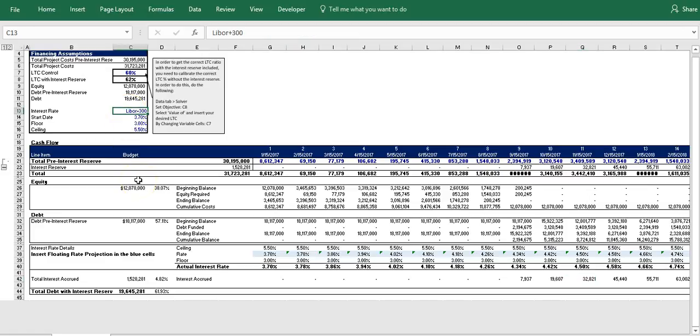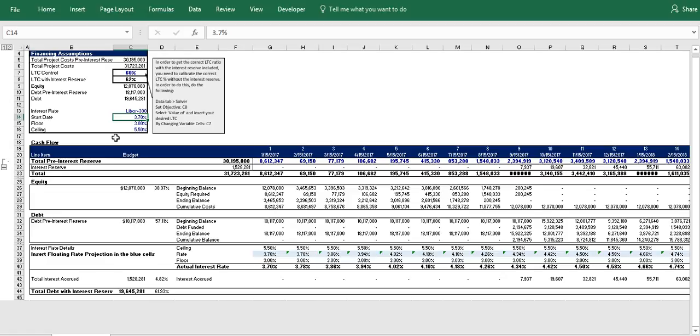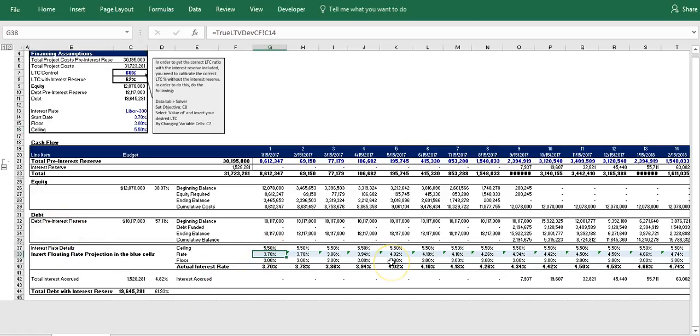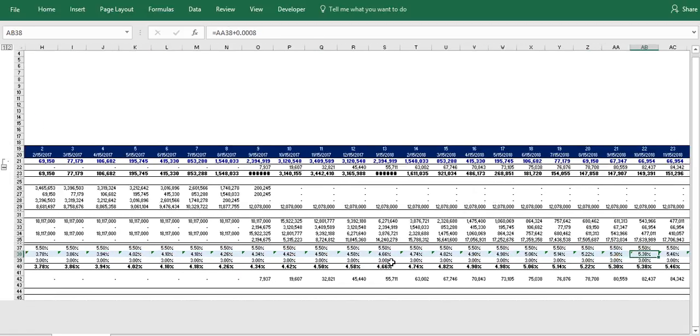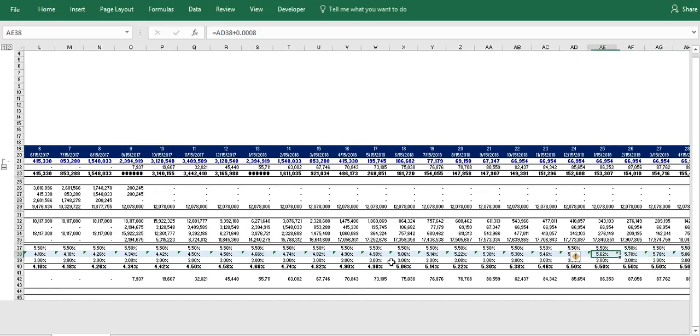So in this model you can see we have our construction loan interest rate is pegged to LIBOR plus 300 basis points. And so we're just going to say at our start date our interest rate is going to be 3.7% and we have a 3% floor and a 5.5% ceiling. And so I'm not going to go into the detail, you can look at the modeling and follow along. So we basically set our starting interest rate in the beginning cell and we create some sort of projection to basically predict what we think the floating rate is going to be going into the future.